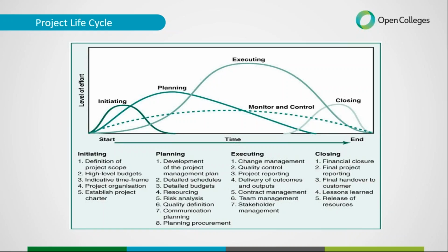And you'll see that dotted line, and that's because we're monitoring and controlling everything during that stage. Are we on track? If not, what do we need to do to get it back on track? Do we need to make a formal change? And then we would complete a change request or a change order form, get that approved, update documents, etc. So the execution stage is where the fun begins and all the true skills of project managing kick into gear in a big way.